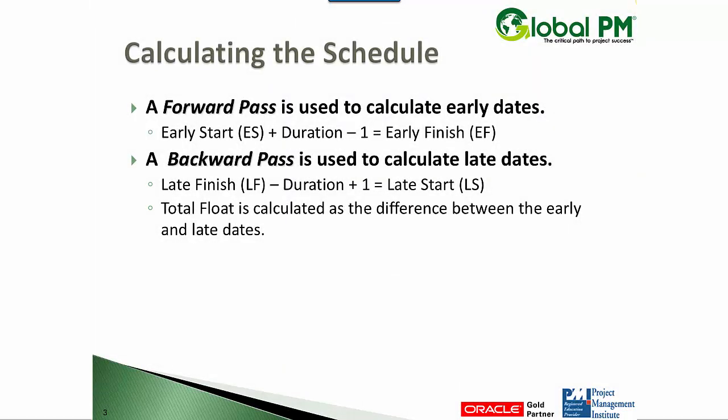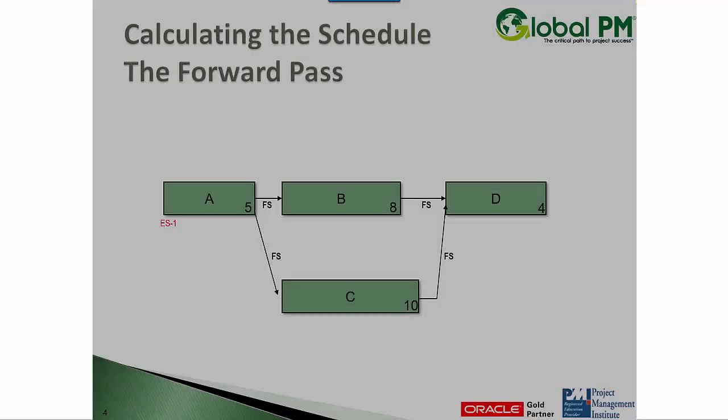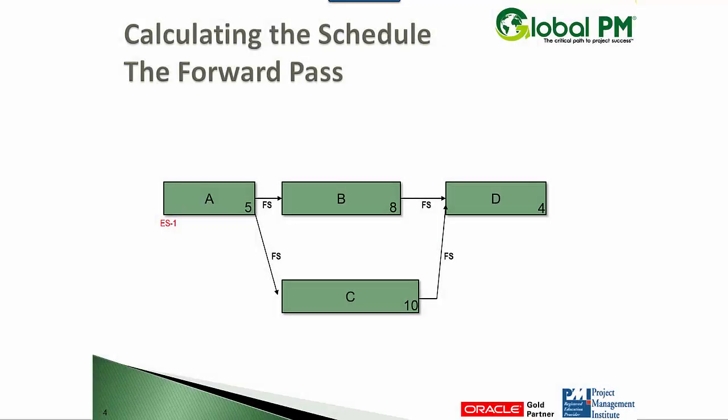In scheduling, we use a forward and backward pass to calculate early and late dates. Let me skip through this slide and show you a visual of what we have. Here's our network diagram. We have four activities, A through D. They're all linked together using finish to start relationships. We have activity A starting on day one.